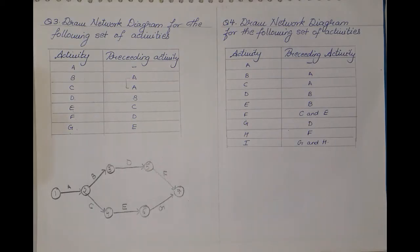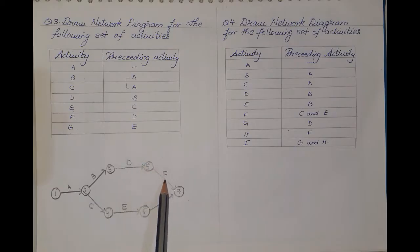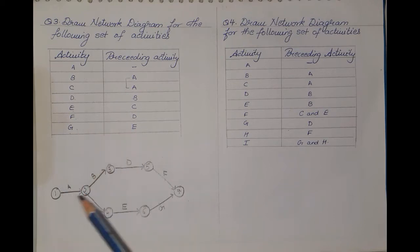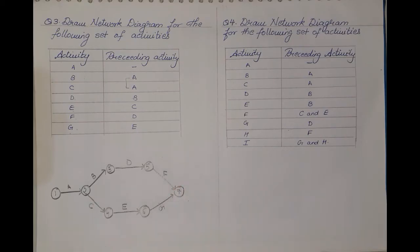Always remember in a network diagram where the diagram is not closing down — in the previous two sums it used to always close to one single activity — here the sum didn't close down naturally, so at the end we need to close it into a complete network diagram. This was question number three, in which the last activities do not merge on their own, and this is how we solve such a sum.